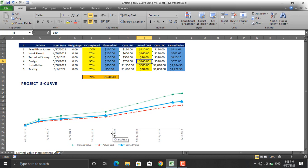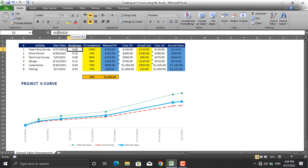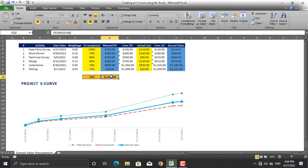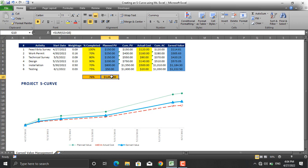So how do we create such diagrams in Microsoft Excel? From here on our calculations began. The weightage, as you can see in the formula, for the weightage it is G3 divided by dollar G dollar 10. This is G3 and G10, that's this cell, which means that in terms of cost, the cost of this activity is divided by the total cost of the project, then the weightage is obtained.